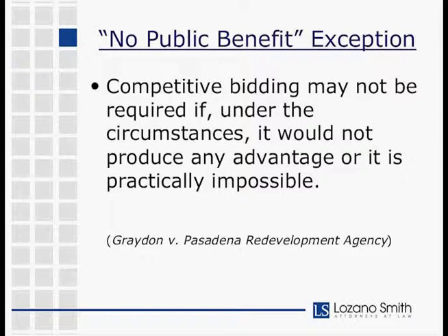What happened there is that the redevelopment agency was building a very large shopping complex, and the last item to be built was the parking structure. Until that was built, the entire complex could not open and begin operating. They needed to open the complex immediately in order to pay down bonded indebtedness on the project. So the time that it would have taken to go out to bid for the parking structure would have cost them so much money that there was absolutely no advantage in that case to competitive bidding the project, so the court allowed it to go forward.